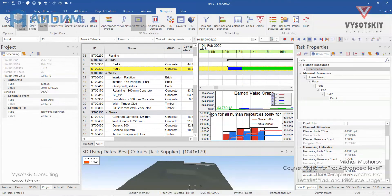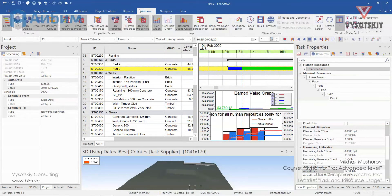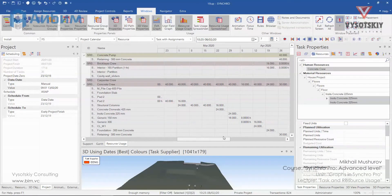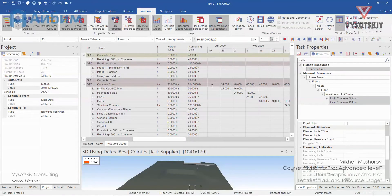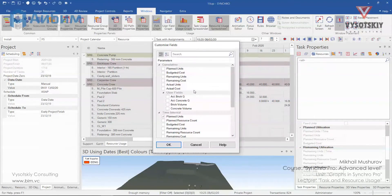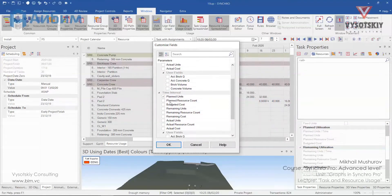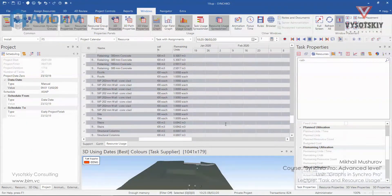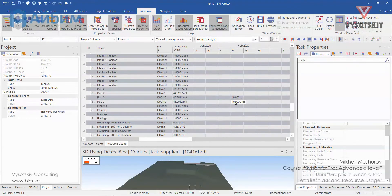Along with that you can open the resource usage spreadsheet under Windows — Resource Usage Spreadsheet. You can see the distribution of planned units, but you can always change it. Right click, Customize Fields, and say you'd like to see actual units — here they are. So this is our pad — 40 cubic meters poured.